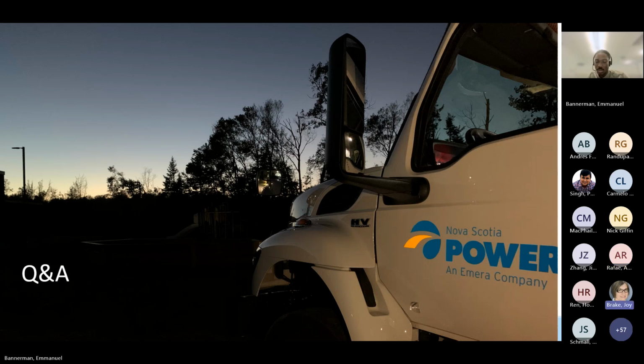So changes like that, the GIP, Generator Interconnection Procedures for Nova Scotia, our province covers that. Basically, if it's a material study, and right now we would consider changing turbines would need a full assessment. So you'd need to come back to get a reassessment based on your turbines. If we get to commissioning and the results don't look the same, it's going to be up to the project to get models that match and work. And if it's a substantial change, then there's going to have to be an arrangement whereby the ISO, which would be us, has to rerun studies, which would delay projects.